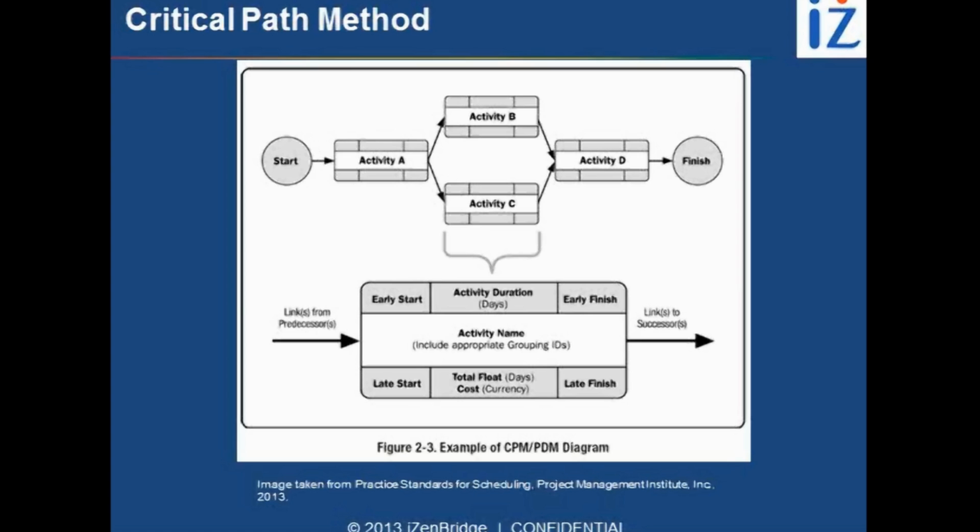Now, when we are identifying these activities, we do a forward duration calculation, which is called forward pass, and we also do a backward pass. While doing this forward and backward pass in the critical path method, we estimate early start and early finish dates. Now, early start and early finish date represents that in order to meet my project targets, the earliest I can start this activity is as per the early start date, and the earliest I should finish this activity is as per the early finish date. There could be a late start and late finish date also. Now you may wonder, why do we have two dates? Why can't we just work on one date? We start on one particular date and we finish on another particular date.